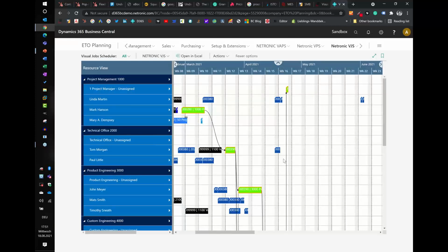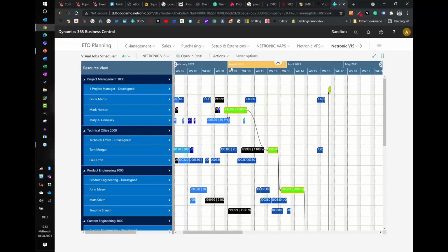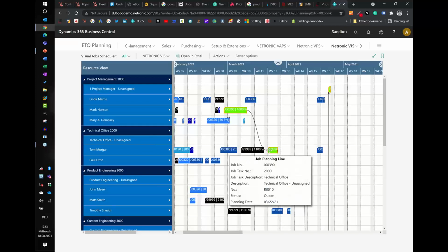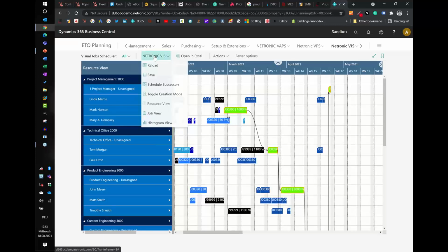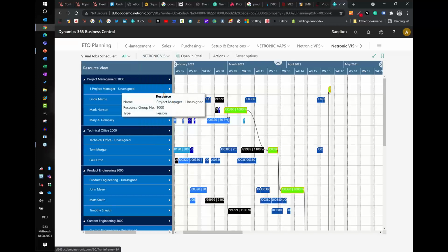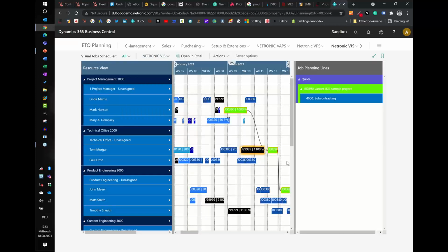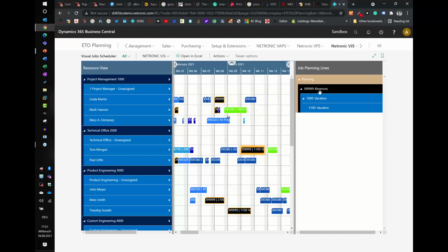Okay, and if now you get a request from Tom, who says, hey, I want to go on vacation in week 13, you can look at this and say, hey, look, Tom, you know what? Get this job done here for whoever the customer was, and then you're okay with the vacation. And then again, you can toggle the creation mode, and then we do it vice versa. You select a bar here, and then you see my job absences.